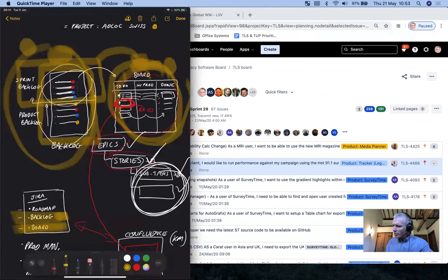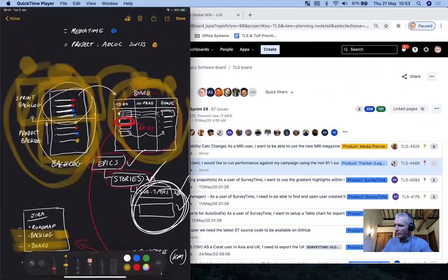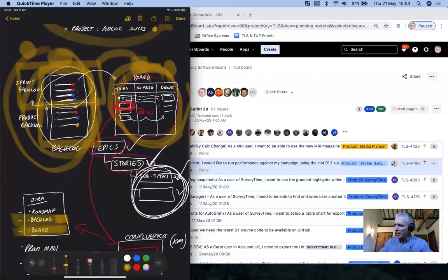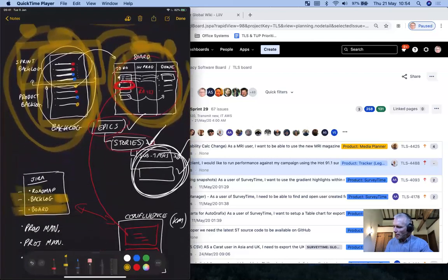And then we sort of elevated back up and we said, well, that's interesting to see a list view of all the work, but it doesn't give us a time dimension. So there's another level of abstraction above, which concerns epics, and the idea that we can have a Gantt chart that shows where we are with epics, and there's a corresponding view in Jira, and that's called roadmap. That's only in Jira Next Gen, new Jira.